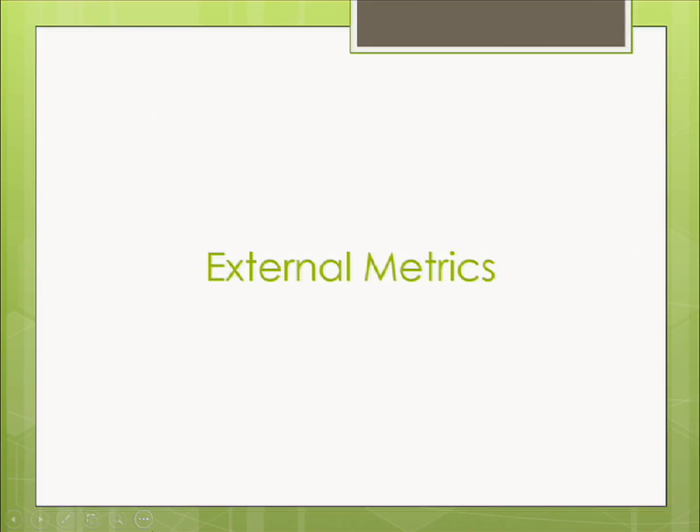Anytime you post metrics, it can really distract the team from the goal. So if you post some kind of chart, people may try to just game the system. So the goal suddenly becomes, we need our velocity to be as high as we can get it. So, well, we don't have time for design meetings. I don't have time to go help this other team because they're about to fall into this big trap. I don't have time to help my other team members with stuff. I don't have time to write tests. We just want to get our velocity chart to look good. Well, now I just directed the team in the wrong direction.